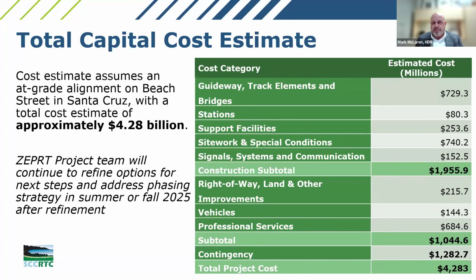It included contingency for the things that are unknowns about the project. So there's environmental mitigations, there's soil conditions, there are other things that at this stage of design we don't have a clear understanding of yet. And so we provide a contingency within the cost estimate to address that, and to make sure that if we identify something that's going to impact that cost or require additional cost, we've made an allowance for it at this stage of the project. And then thirdly is the professional services.